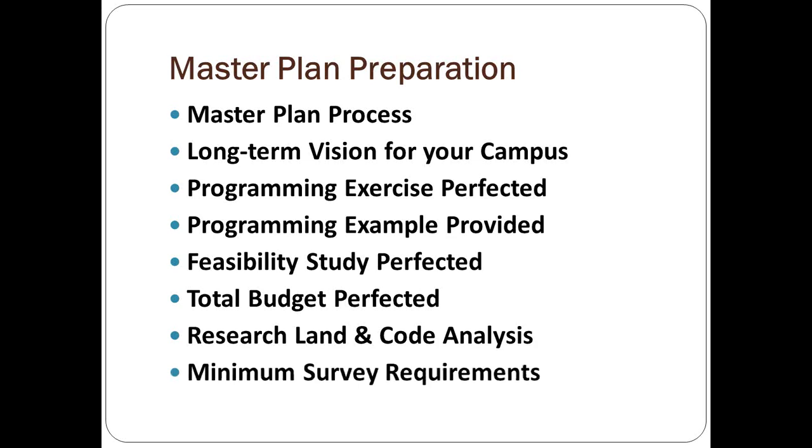The last thing in preparation that I'm listing today is a minimum survey requirement. One of the things that the civil engineer and the architect are going to ask you for is a recent professionally performed topo and boundary survey. It is like the Bible to them as they start.